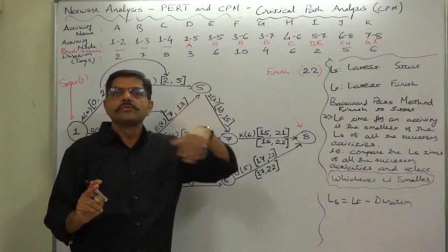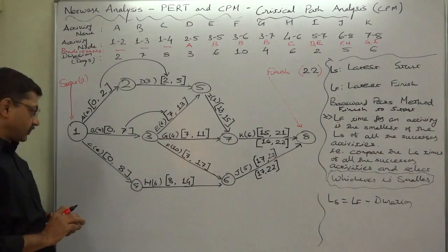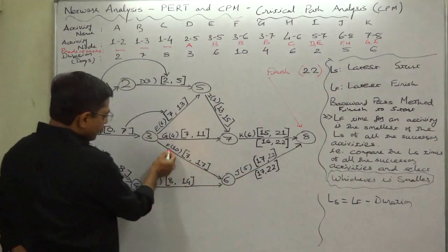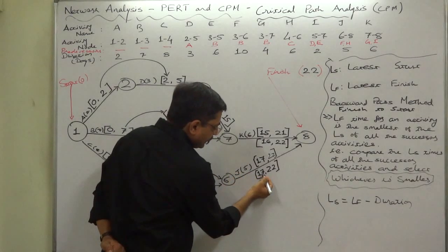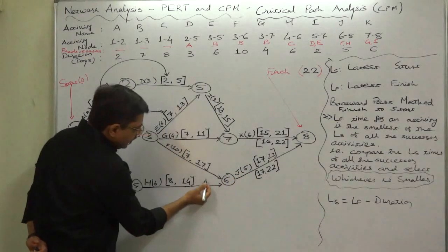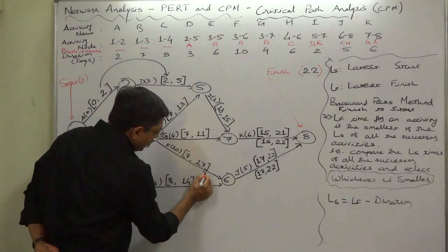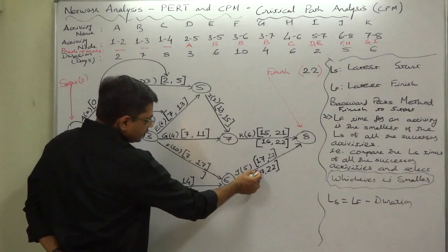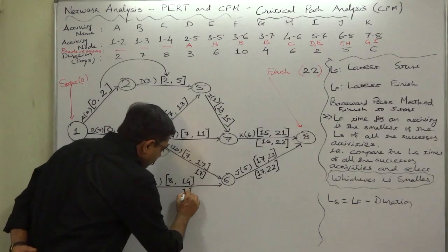The meaning of this flexibility we are going to discuss in the next few lectures - slacks and floats. Now, J is the successor of two activities F and H. J's latest start time will become the latest finish time of its predecessors. So for both H and F, this 17th day - the latest start of J - becomes the latest finish time of F as well as H.